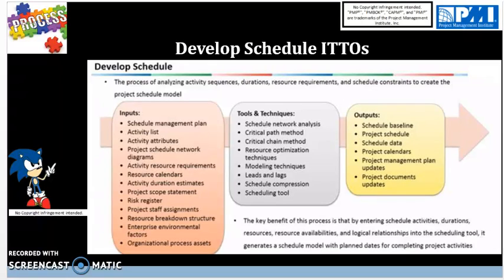It is if-then scenario calculation where the software or computer simulation takes the PERT formula, P plus 4M plus O, so P is for pessimistic, plus 4 into M, most likely estimate, plus O, optimistic, all divided by 6, and calculates it multiple times over, providing a probability of completing the project in a certain time frame. Leads and lags. Leads are hurry time and lags are wait time.